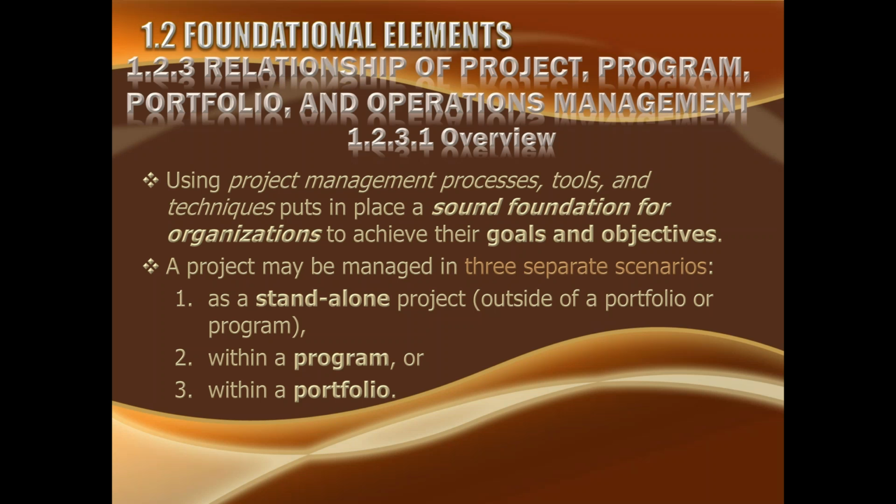Projects will not be responsible for the benefit realization of their products, but the program under which these projects are being run will take on the responsibility of not only realizing the benefits of those projects, but unifying those benefits into a whole overall benefit of the program. The program benefit would be yielded by combining all the benefits of all the projects into a wholesome objective. So programs have their own strategy.